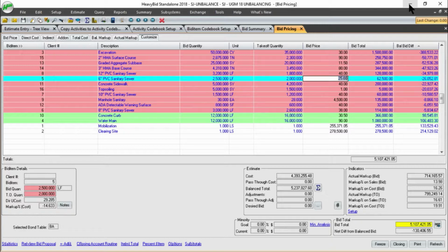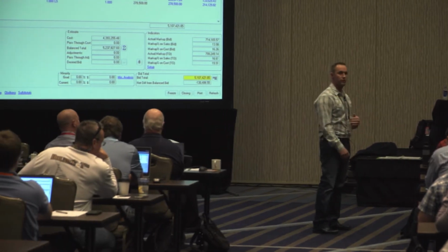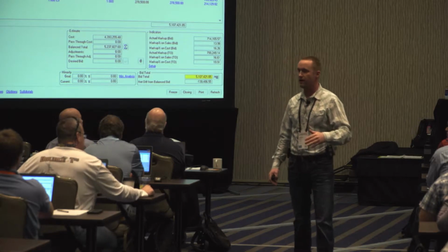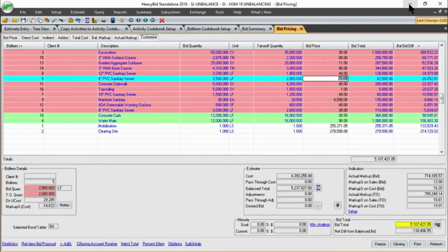Now there's some tricks of the trade, right? If you're in New Jersey, I don't know why, but they can't get it through their head how much tack oil goes down. The contractors consistently lay 0.1 gallons per square yard, yet their factor is 0.5 every job. So everybody in the state of New Jersey pennies tack. So in that particular case, I actually move that money, and that way those dollars don't show up in that plus minus screen, because I know that's not a risk.